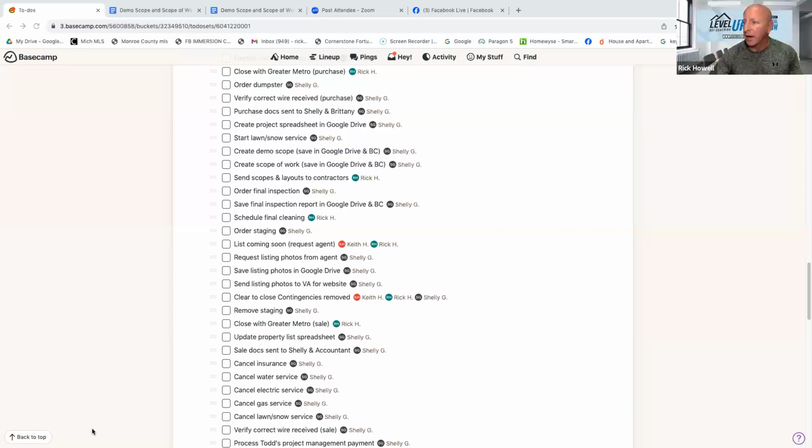All right, let me get back to where I was at here. All right, so after your home inspection, you are going to, where am I at? Schedule your final cleaning. She'll schedule the final cleaning. The cleaning lady will come out and clean the house. Last but not least, you're going to stage the project, right? You're going to order your staging. Always, always, always, always stage your property when you're rehabbing a house. From there, your agent's going to list it coming soon. Photos. This is all just the admin minutiae stuff at the end of a deal.